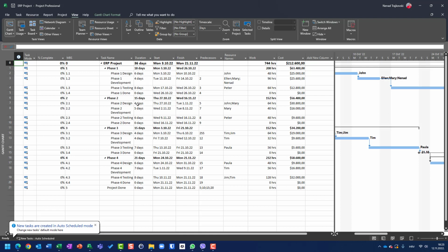view is applied. So when you modify a view, it is simple. You can modify it as you want. When you copy this modification, according to the table which was modified, to global MPT, it will be applied to all new projects. But when you move something in global MPT or change something in global MPT, it will not be applied to existing projects. So the question is, how can I apply from global MPT view to an existing project?